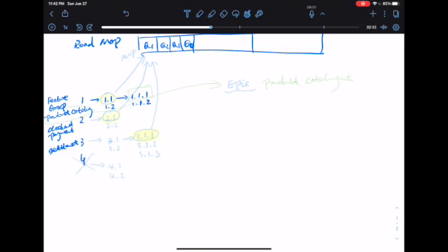And then you can decide that, okay, for my MVP, I have this 1.1, which I must deliver for my MVP, which is going to be in Q1, right? And then for this 2, I have this 2.1, and maybe I just need this 2.1 for my MVP in Q1.